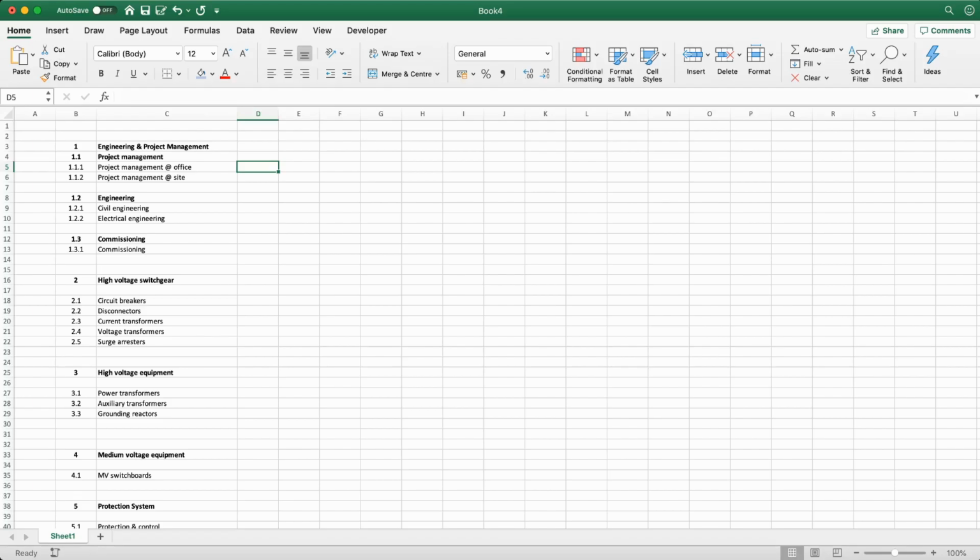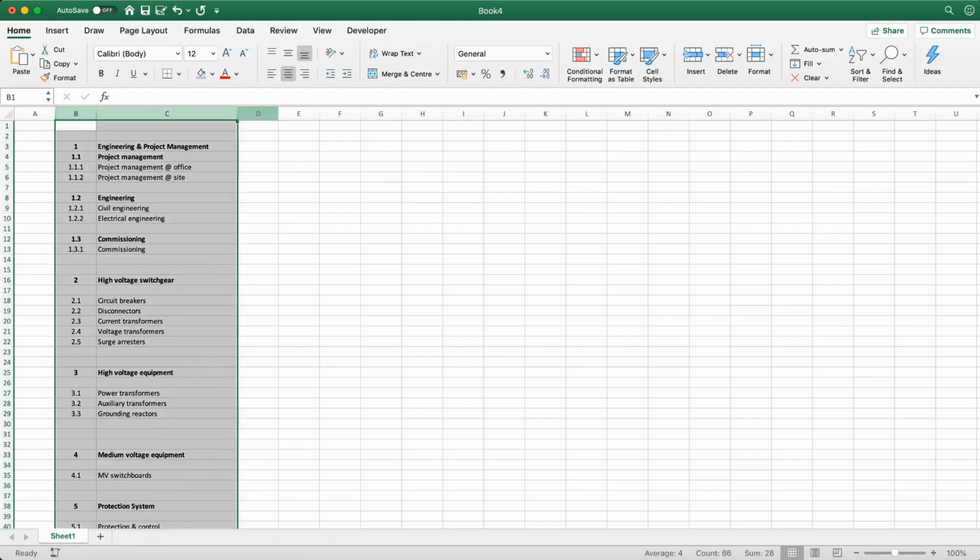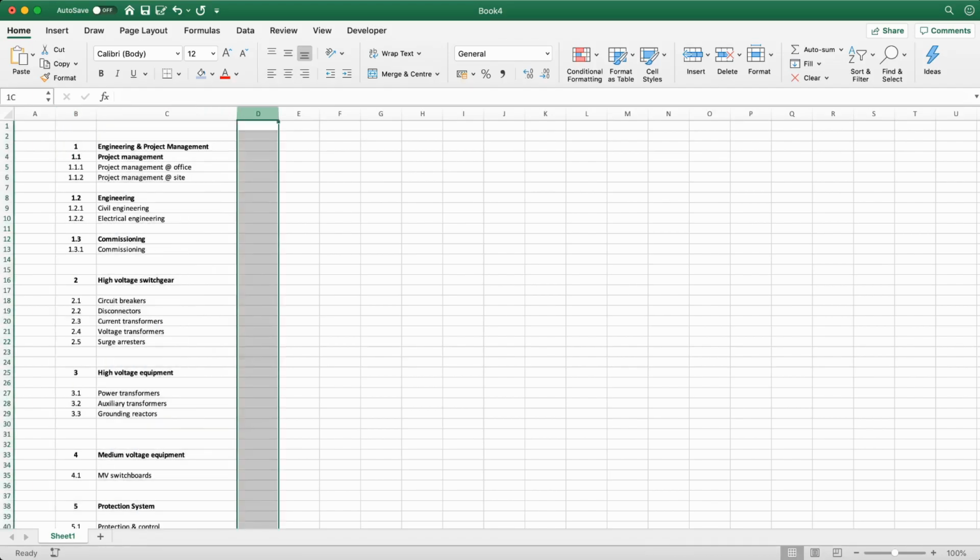Now, as soon as we have this very basic structure, we'll start to add the columns. So project calculations are usually organized by columns. On the lines, what you detail is the tasks or the components, the supplies and services that you want to procure and execute and so on. And then column-wise, you start to work on the quantities, the pricing, taxes, selling price, fees, gross margins, and so on. So to keep this simple, let's start with the first one, which are the units.